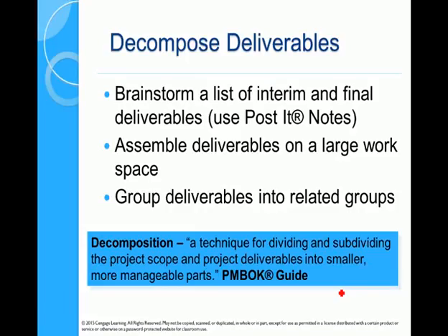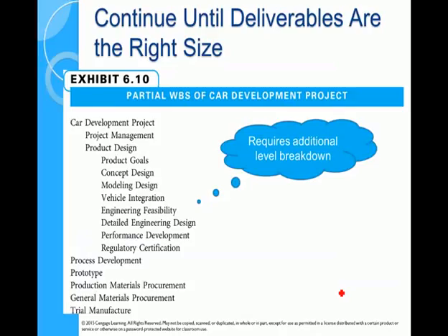How do we go about creating a work breakdown structure? It's decomposing the project. We start with major deliverables, and then we decompose that into smaller groups, until we get down to this thing called a work package. So, how far should we go? When do we stop? You can see here we're dividing this up into sections. Should we go further? Have we stopped?